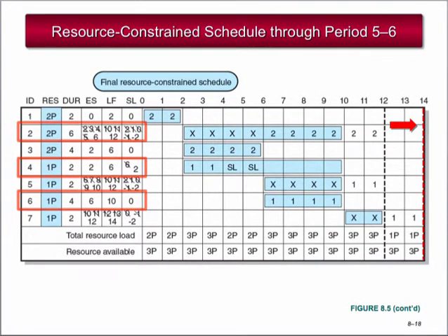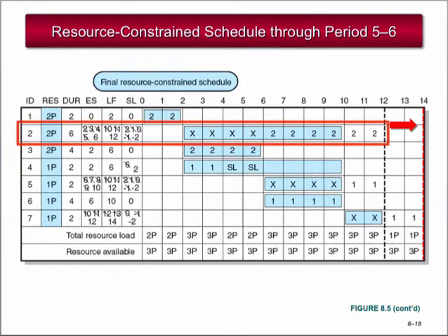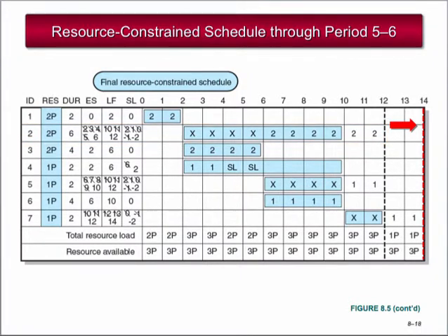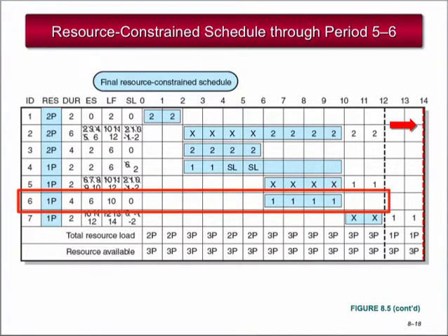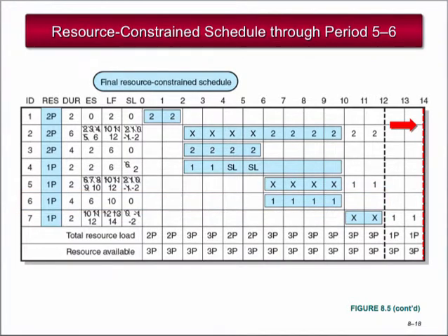Activities 2, 4, and 6 are eligible with slack of -2, 2, and 0 respectively. Load Activity 2 into the schedule per Rule 1, which again is minimum slack. Because Activity 6 has 0 slack, it is the next eligible activity. Load Activity 6 into the schedule, again using Rule 1. The programmer limit of 3 has been reached, so we delay Activity 5 and update early start to 7 and slack to 1. For periods 7 to 8, the limit is reached.